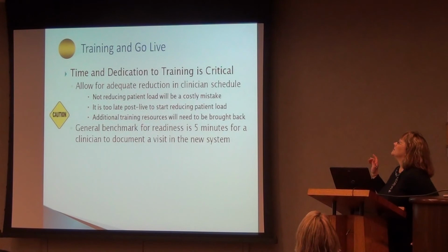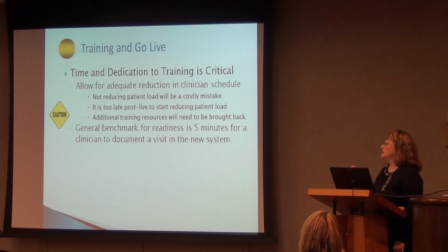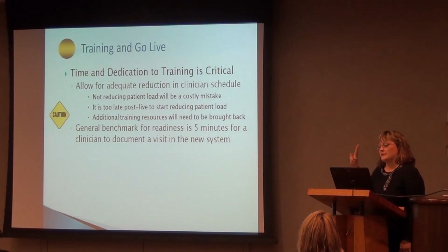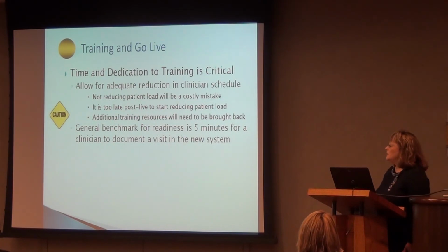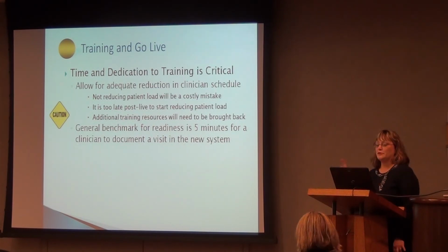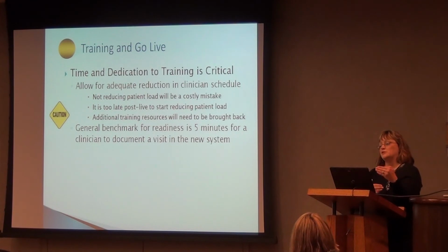It is critical that you reduce your patient load for the first visits you do in the EHR. If you don't, you'll pay for it later. You've got to give the physician time to get comfortable doing that note electronically and seeing their patients. If you keep the patient load at typically 25 to 30, and then you force them to keep that pace plus learn a system, you will kill the doctor.